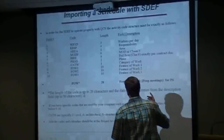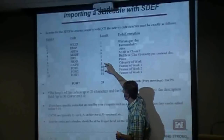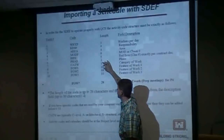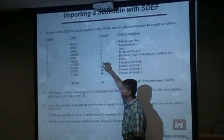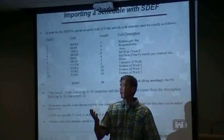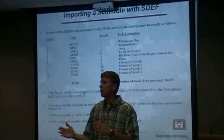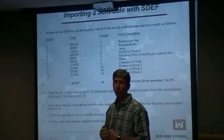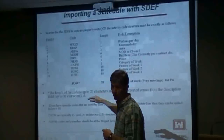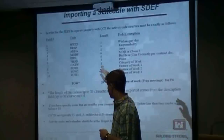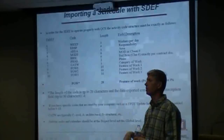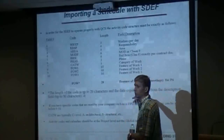If you want to import into QCS, some contractors like using the format like 0-3200-1, which keeps all your characters in the first 10. These are essentially placeholder spaces, but you've got to take them up. You will still have about 8 open characters at the end that you can use for update codes or if a scheduling firm runs update codes. You can add 8 codes below after you set these up. But if these aren't right, you will never get off the starting point — they won't let you proceed until you get these right.